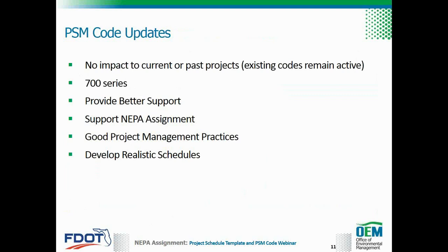With consistent codes, the OEM office will now be able to provide better support to all the districts. The introduction of these codes will also help support NEPA assignment. As you know, FHWA will be auditing FDOT for the next 4 years. With the introduction of these PSM codes, it is very possible that many of their questions on study durations and timing can be answered by running a query in central office rather than sending multiple requests to each district. The use of PSM codes and schedules is good project management practice and will help develop realistic schedules. Project managers should review each activity to make sure the duration is realistic.